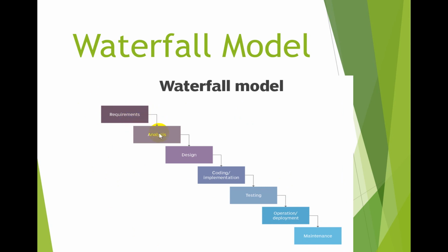So during these phases, I hope you understood. Once we navigate to the next phase, we cannot accept the previous phase's changes. Suppose you have completed the requirement phase, you've taken all the information from the client, and now you are in the analysis phase. At that moment, if the client comes and says, I want this kind of change, this is not acceptable, because this is the waterfall model. In the waterfall model, we cannot accept the previous step's changes when we are working in the next step. Okay, so I hope you understood.